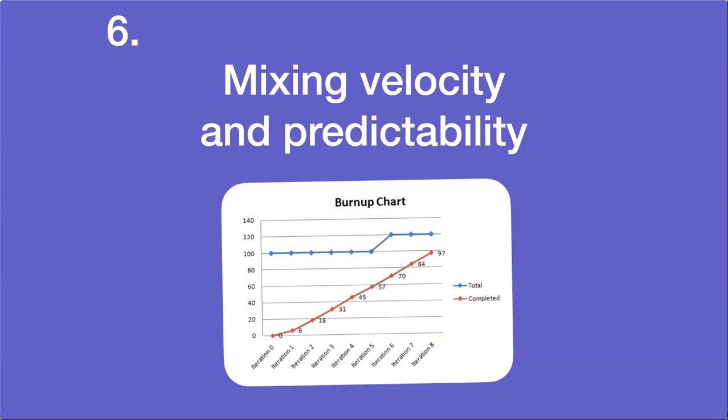So first of all, it's not comparable between teams in any way. It might be a helpful tool for improving your sprint planning and understanding how much work to include there. I think most healthy teams don't necessarily even need that. So you can get away from even estimating at all if you're able to just continuously ship and you have a good understanding of your team's capacity. But ultimately, it's a measure of predictability. So did we do what we said we would do?